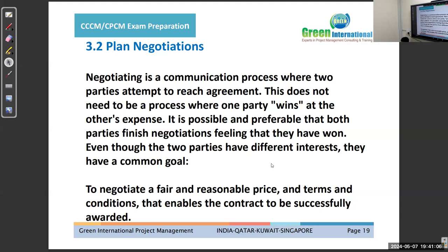Maybe we are keeping extra profits on that. If not, maybe 950,000. So in our mindset, we must set one figure before going into negotiation, so that will be really useful. We must understand that this is our ceiling price. From this figure we will not be breaking it up, and if it matches, we will agree on that point. So all these things have to be considered in mind before going to negotiations.